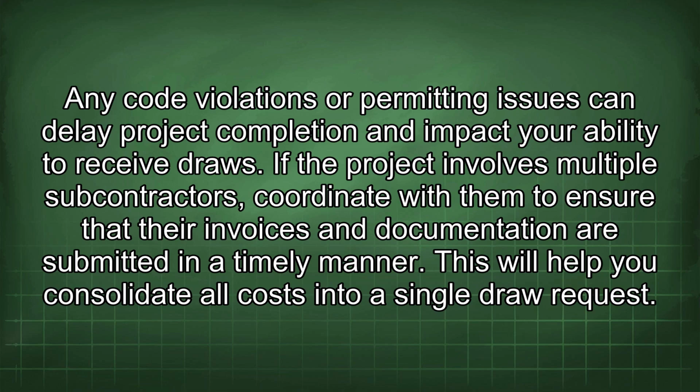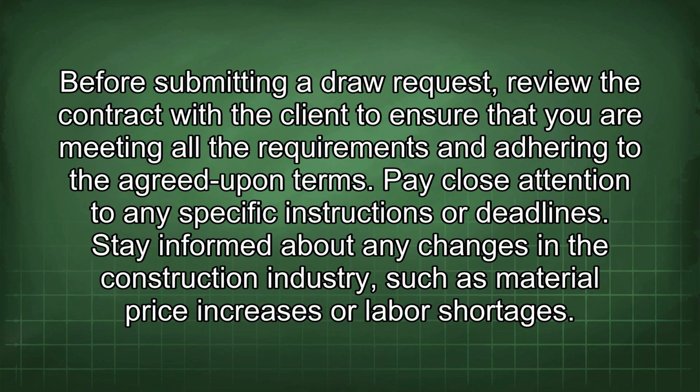If the project involves multiple subcontractors, coordinate with them to ensure that their invoices and documentation are submitted in a timely manner. This will help you consolidate all costs into a single draw request. Before submitting a draw request, review the contract with the client to ensure that you are meeting all the requirements and adhering to the agreed upon terms. Pay close attention to any specific instructions or deadlines.